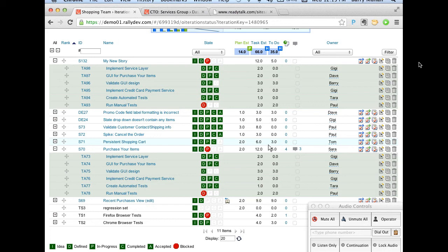The workspace project thing is once again a balancing act in that we have that option to give everybody complete project configurability. The problem with that though is you get a divergence of configurations, which, A, adds to administration, but B, makes it harder to create a rolled up view that makes sense. And so the workspace model trades complete configurability off against a consistent and generally fairly easy to administer model. And so especially for large organizations, that's really important.